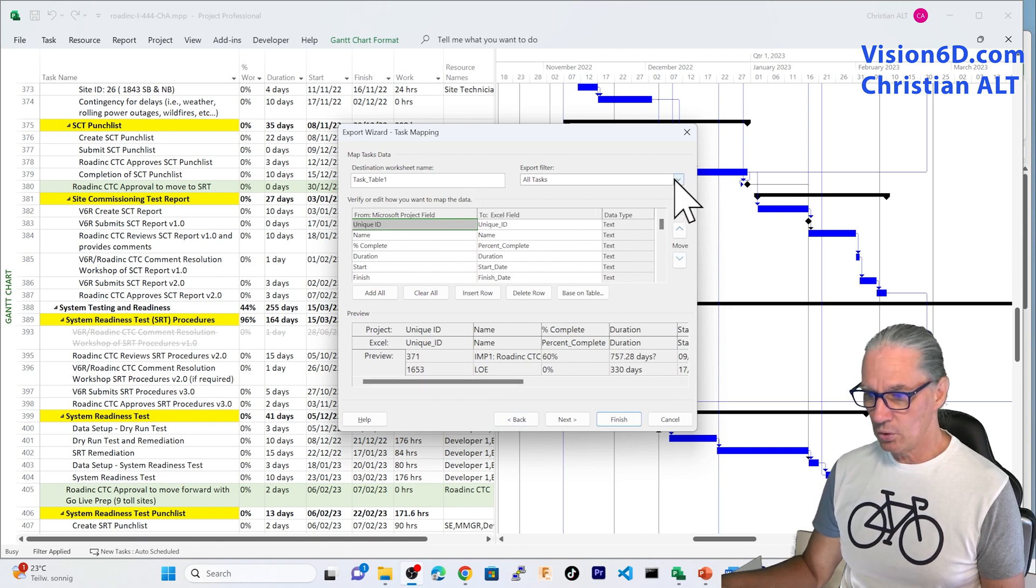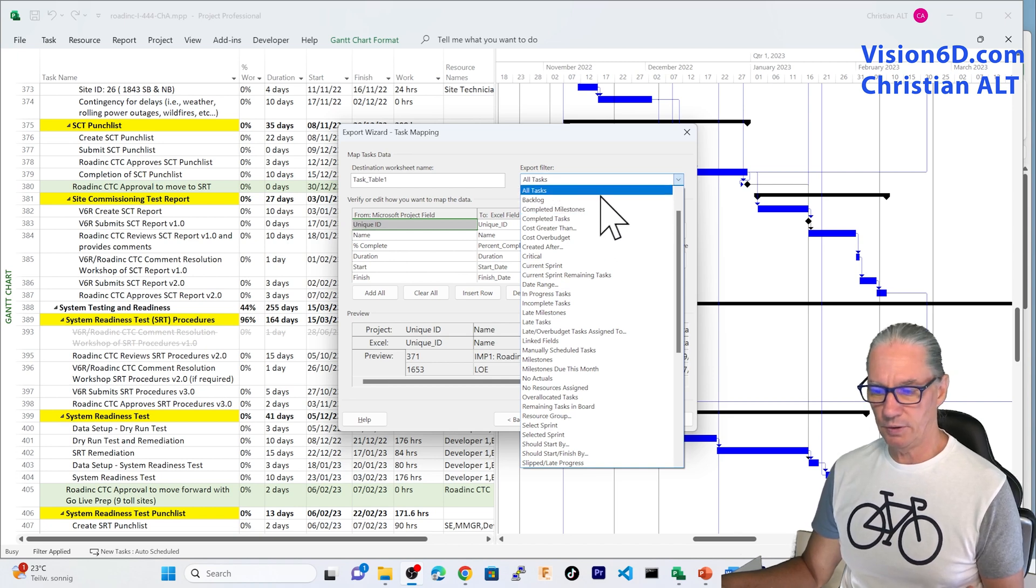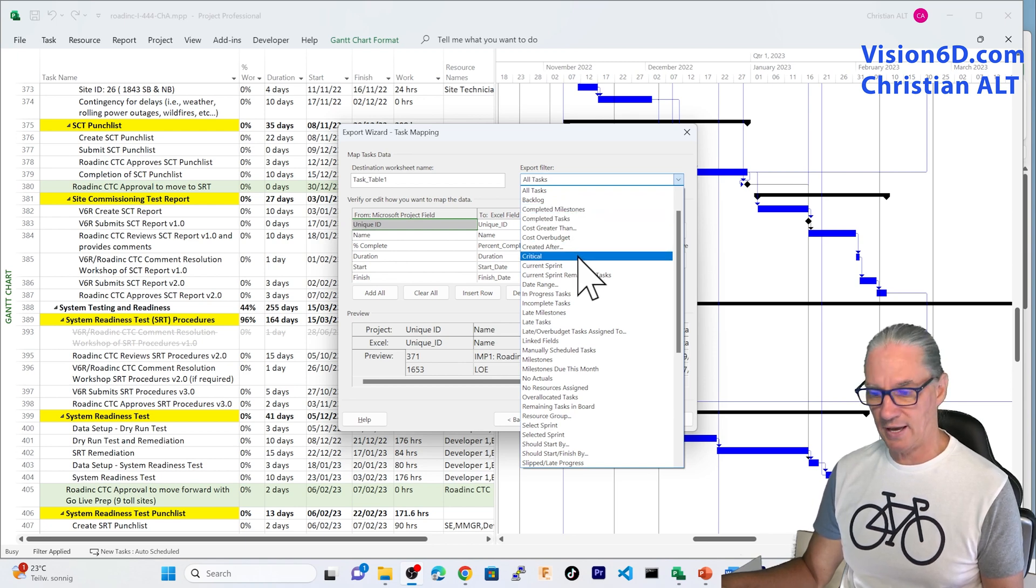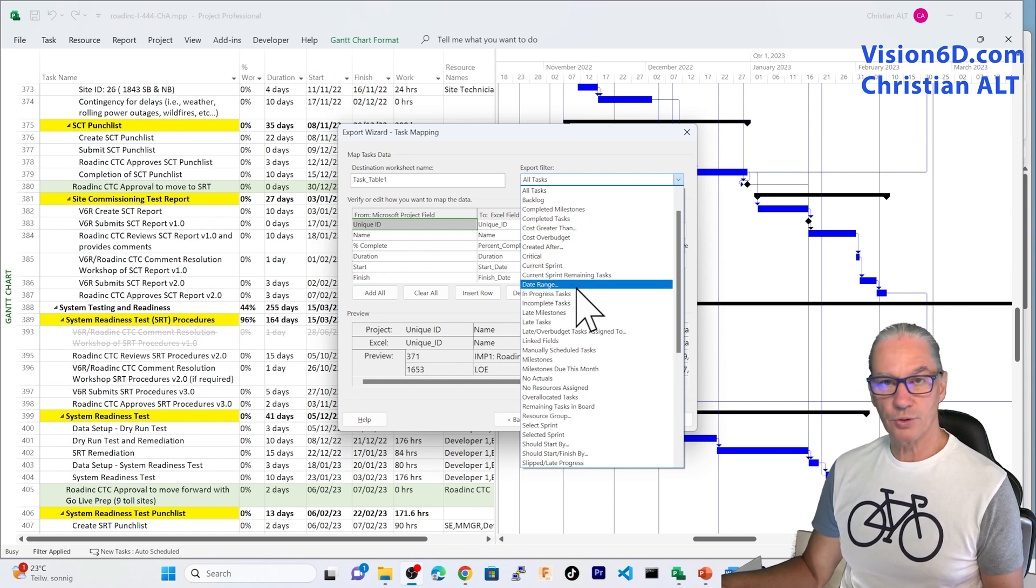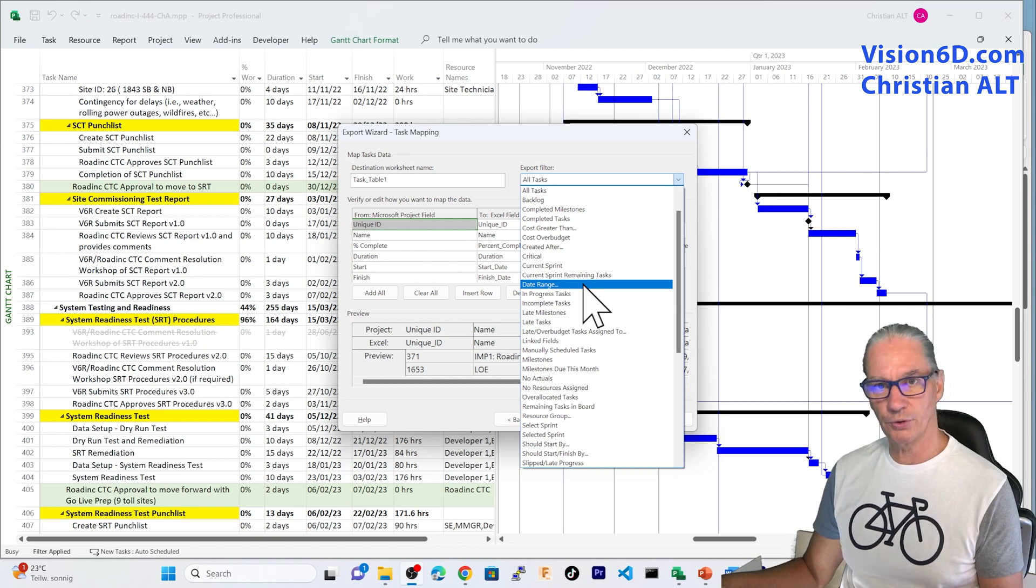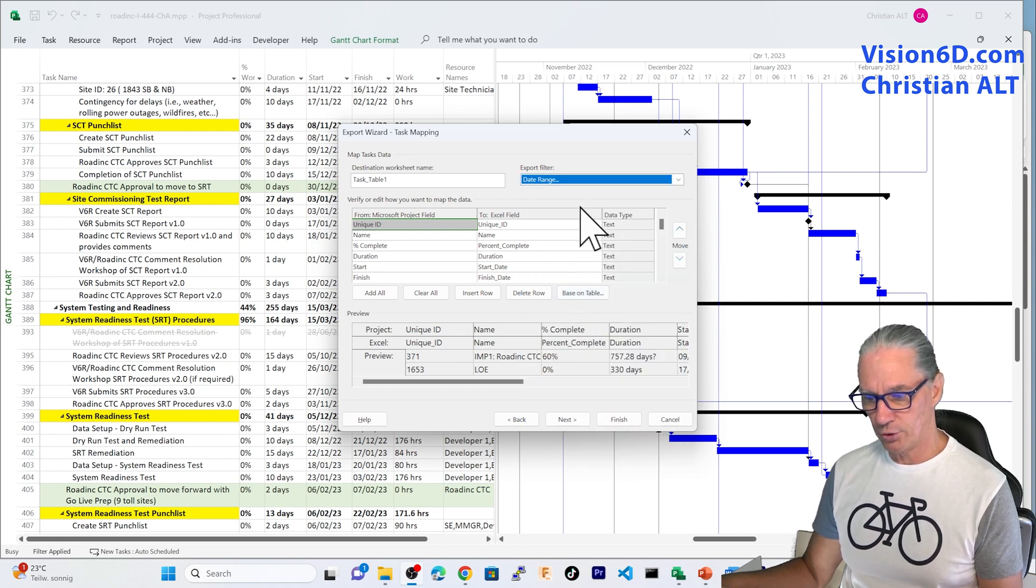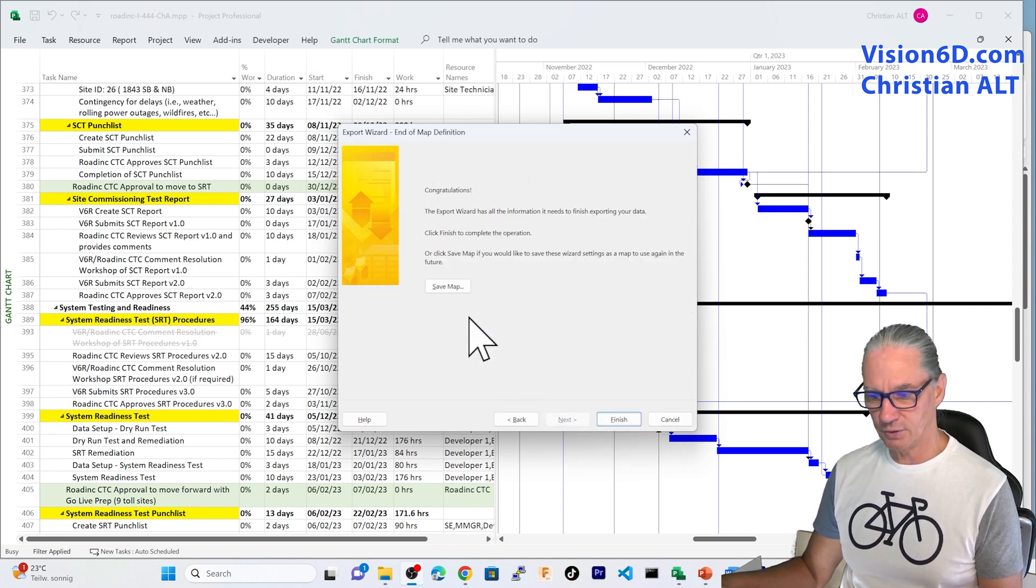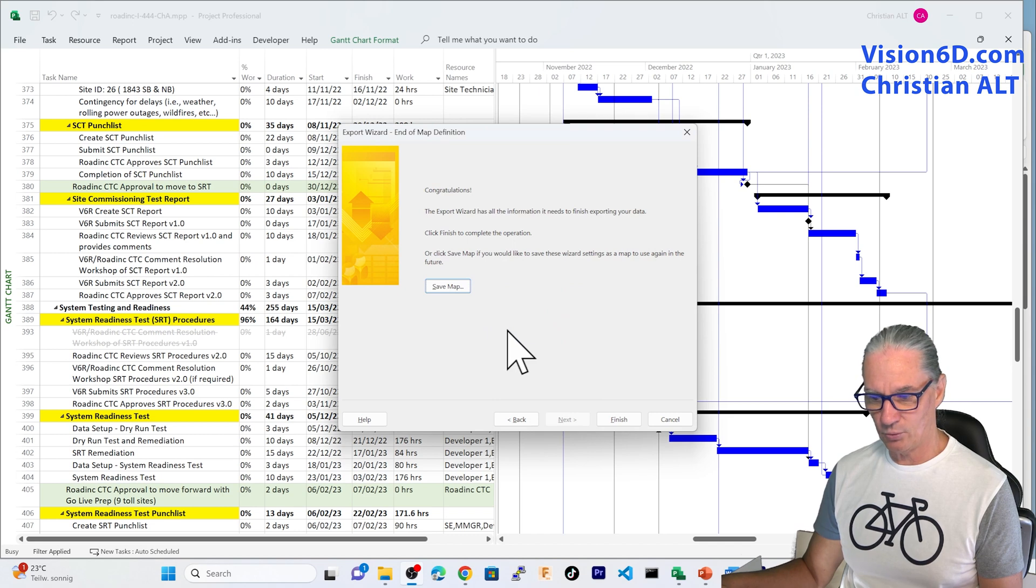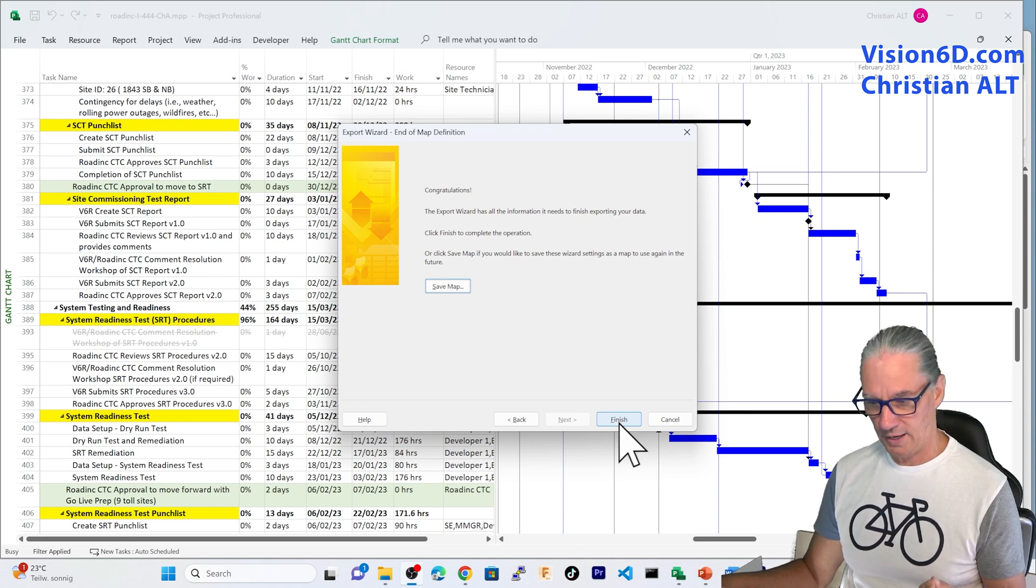So, from here, I can go back because I said that I wanted to show you about the filter. So, into the export filter, we see that there are many different possibilities. You can define the backlog, completed milestones. You could extract the critical tasks. And what I'm interested to show you is a date range. That is to say that I want the data for a certain date range of my project. So, I've chosen that. So, now, I go again into next. We could save again. I'm going to say save. OK. I want to rewrite it once again. From here on, now, I can proceed and we'll see what happens.